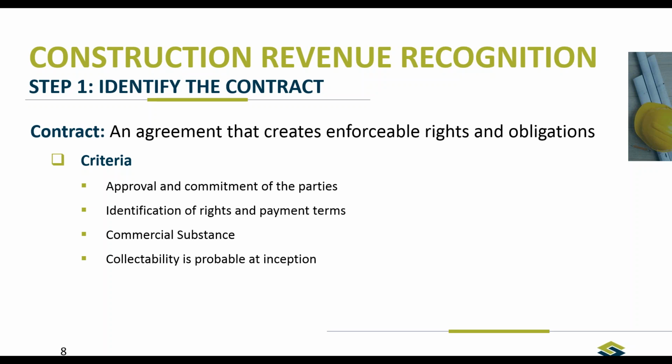In that existing $2 million contract, there could have been things included in that contract that you never really assessed before. Now you would have to assess things like general conditions. If you have a $2 million contract and a lot of that contract provides for general conditions, you have to do an assessment prior to recognizing any revenue on that contract. What's the likelihood of you using all the general conditions within that contract?